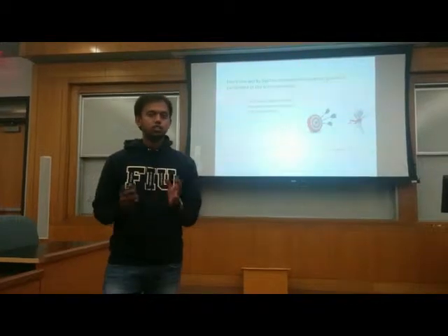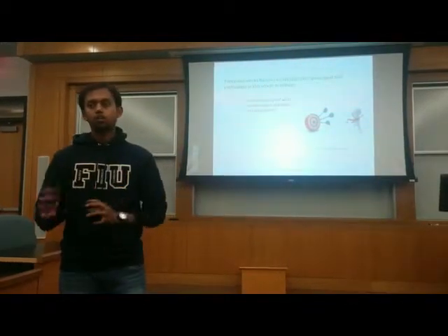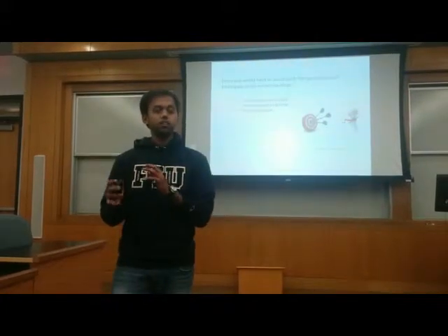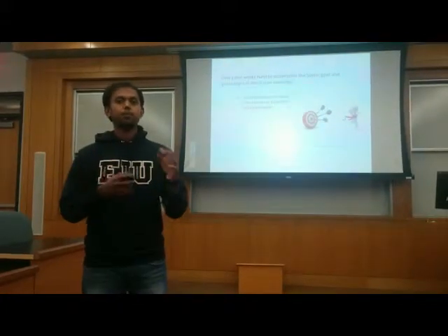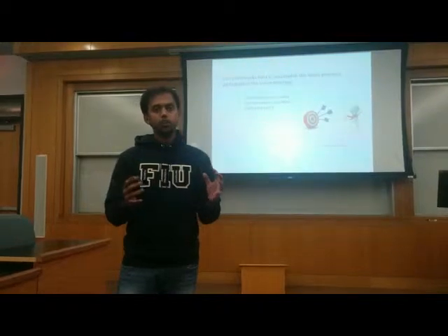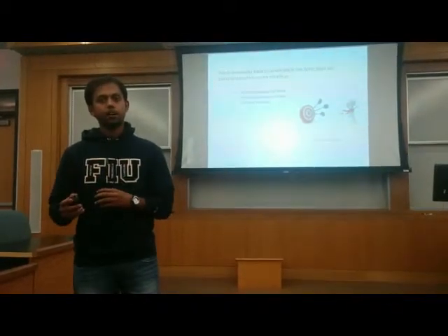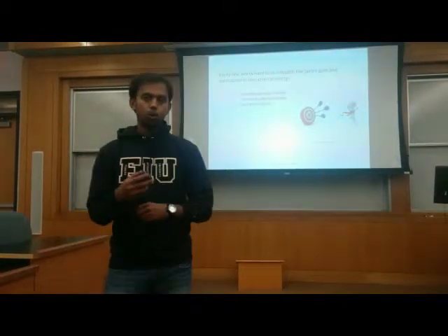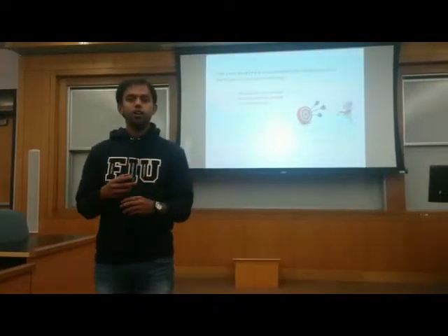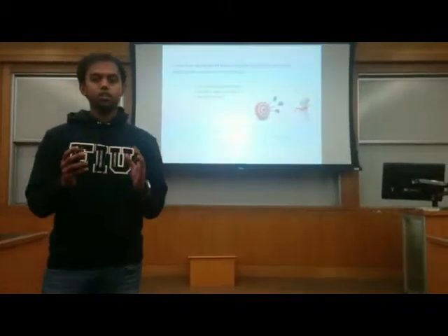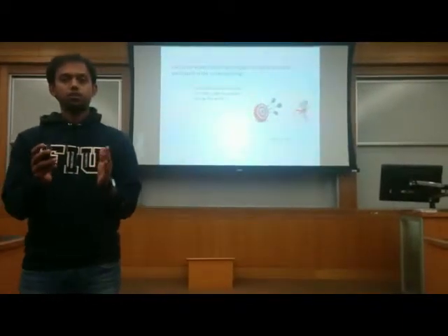Sprint goal is nothing but a short description of what the team is going to achieve during that particular sprint, and this goal is defined during the pre-sprint process when the product owner and the Scrum team sit together to work on the product backlog and the sprint backlog. The sprint goal is set and made aware to all the team members: this is the sprint goal, and we have to achieve it.